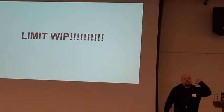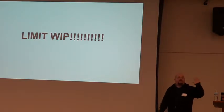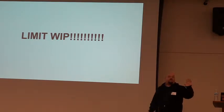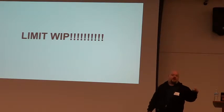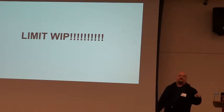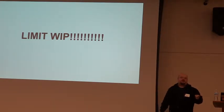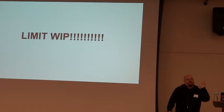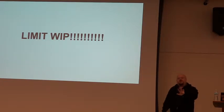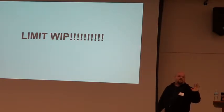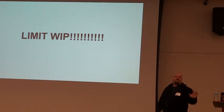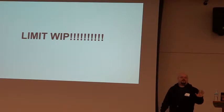The developer shouldn't have to worry about any more than the one they're going to get done this week or whatnot. So we're going to put a queue on how many items are in the backlog for the devs to pick from. Because we don't want them reading 50 cards and trying to figure out which one looks interesting. They'll spend half a day doing it. Right? So if we can move five guys in a week, maybe we'll put seven in the backlog. And that's limiting the backlog work in progress available. Right?